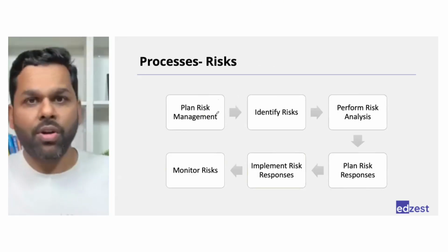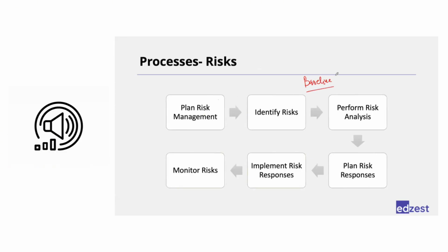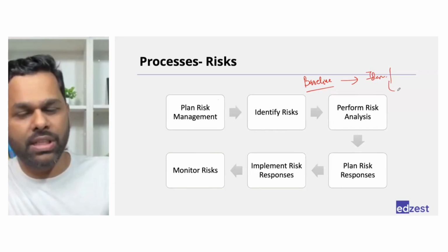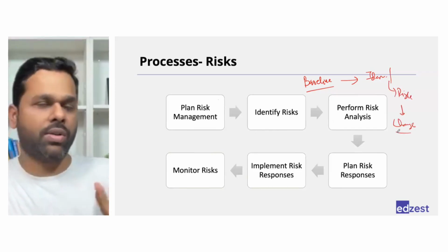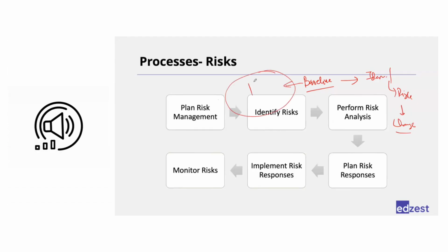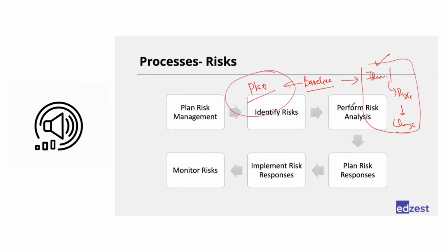Yeah, after you have got the sign off on the baseline, right? Scope, schedule, and cost baseline, and then you have identified a new risk which will incorporate some kind of change, then you need to go back to change control. Before the baseline, if you identified the risk, it will be a part of your plan. For that, you don't need approval. But after the baseline, whatever new things you do need to go for approval.